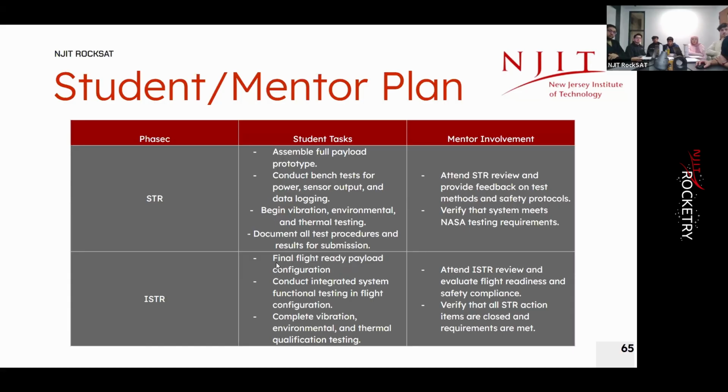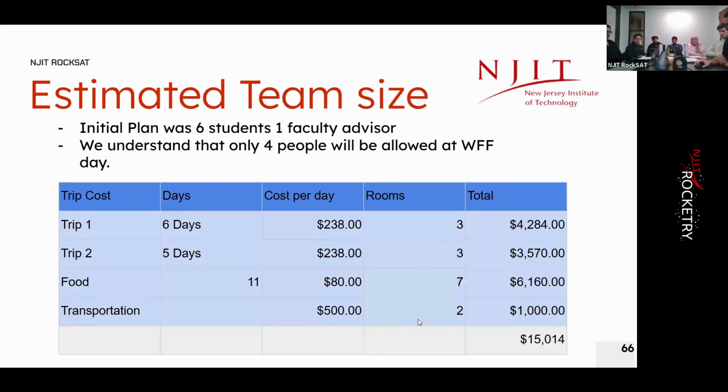For the ISTR, we plan to do final flight-ready payload configuration, conduct integration, system and functional testing, and flight configuration, and complete vibration, environmental, and thermal testing on a physical model rather than just on FEA. And then the mentor is going to attend and review all these tests and ensure that we're doing it correctly. He's going to verify that all the STR action items are closed and all the requirements are met.